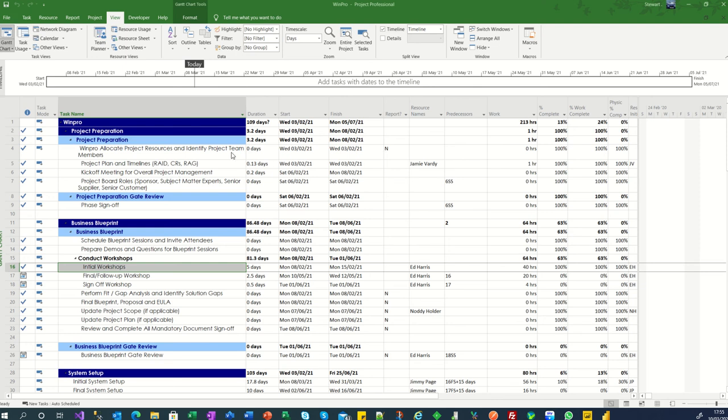Anyway, this is one of the text fields, Report, and if we get an N or NO in there, uppercase or lowercase, that task will not appear in the data. None of the summary tasks will appear either. They're noise, right? We don't want to report on those, do we?